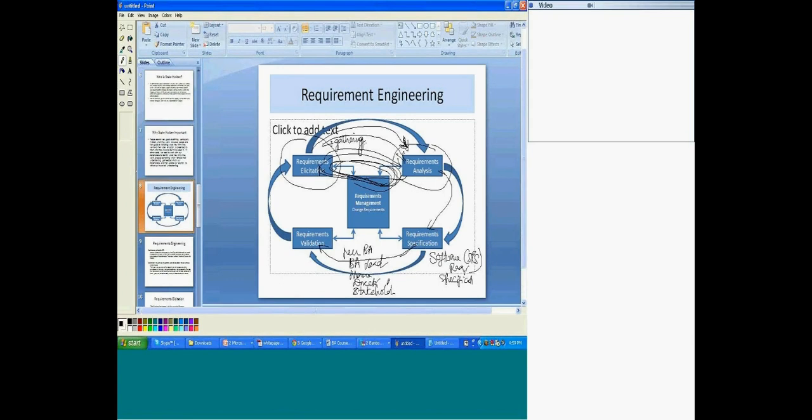A business partner is one stakeholder. Or sometimes the developers, the dev lead, can review this document. So all these folks will review the document in the requirement validation phase, and then officially they sign off: the SRS document is fine and formally completed. So you will start on the design of the application.